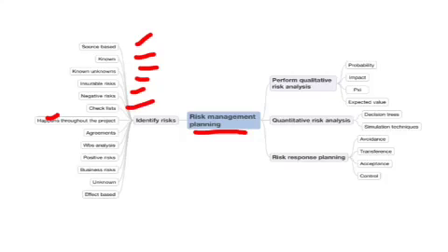Checklist is a tool which is primarily used for risk identification, and as we discussed earlier, it happens throughout the project. And if you review the agreements, that may be a great source for risk identification. A work breakdown structure analysis also will throw out some risk, because in the WBS section we discussed about work packages operated through control accounts where we don't have complete visibility. So every work package that is operated through a control account is a risk.